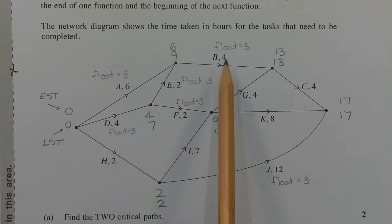Moving on. If we look at task B starting at six, adding four hours, that equals ten. Notice that I've got a thirteen here. That's because there's another way to get to this vertex here. Let's go back to vertex F. Starting at four, adding two, we get to six. Notice that there's a nine here because there's another way to get to this vertex also.